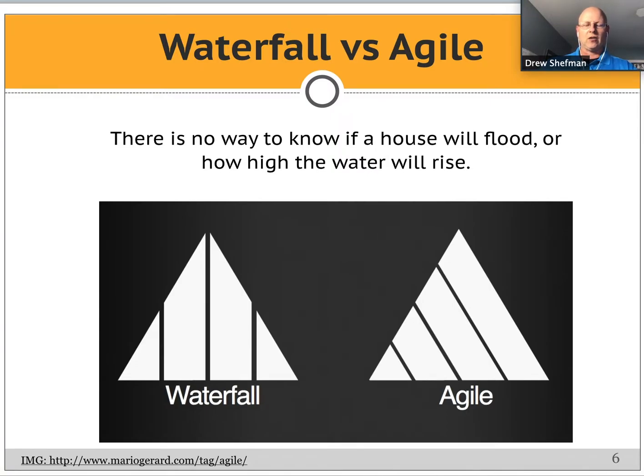With a waterfall triangle, where it's divided sort of equally across the triangle, notice that you never really end up with the equilateral triangle until the very, very end when everything is complete. But in the Agile model, where the triangle is divided up more that way, notice that as each iteration grows, you end up with a full equilateral triangle, towards the principle of being able to release the most valuable product early and often all the way through Agile. So I really like these triangle models for describing those things.